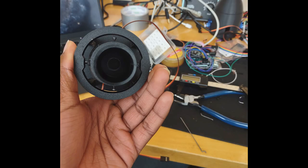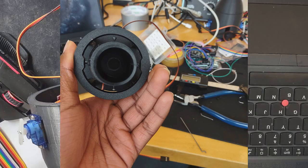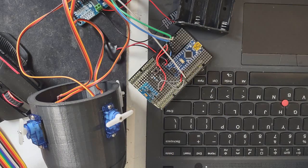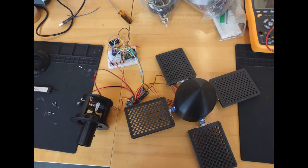Our failures would be more towards the building of that design where we ended up having some issues with our 3D printed parts where they would be glued incorrectly together in our TVC system and having to realign and rebuild some of these products. These were failures we did not expect and affected our time management as well as our Gantt chart, as this delayed certain tasks for longer days than they should have been.